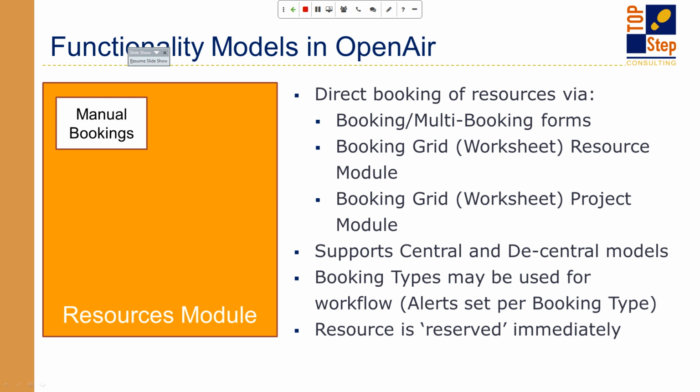They'll change the booking type and hit save. You can have another notification set up so that when a booking is updated and the booking type is changed to confirmed, an email goes out. This is really helpful. You can send an email to the original requester, the project owner from the project on the booking, and the booking resource themselves, just saying, hey, FYI, you have a new confirmed booking. So booking types are really powerful.